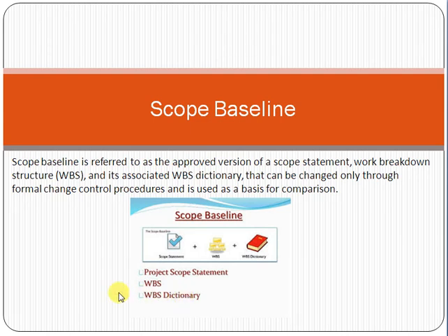and how much effort, how much cost is required to do this task. So WBS dictionary, friend, just simply imagine, it is just a detail pertaining to that particular task. For example, same requirement, customer can do the payment through debit card. Who is the assigned resource to do that requirement? How much cost is required? What is the task number as per the project plan? What is the scope number as per the signed scope of work?